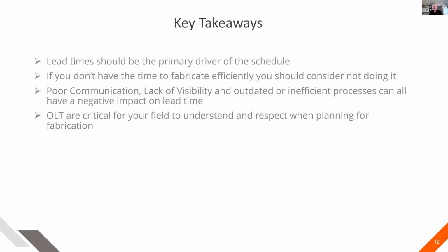But I think OLT, which is overhead lead time, is critical for your field to understand and respect when planning for fabrication. And I think if you're not calculating those things today, you should really take a look back at the historical information that you may have to try to determine what that is. And if you can't, then just study it going forward and try to work with it. And I think you'll find that it can help you out if it's being done correctly.